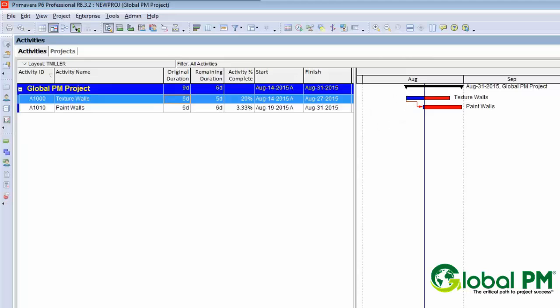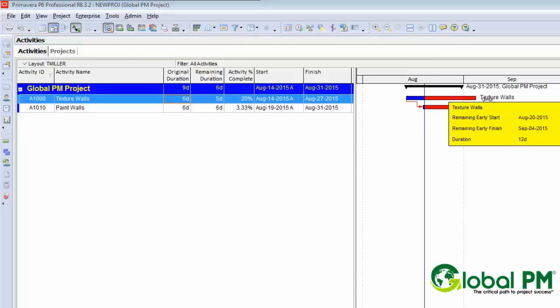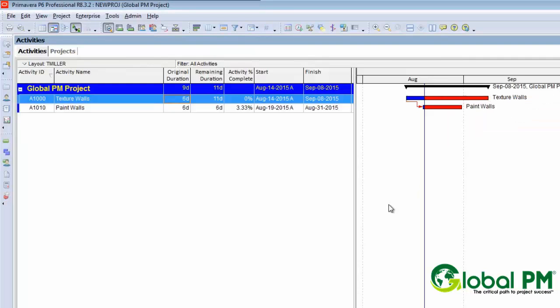Perhaps the situation is we're moving from one room to the next — texture room one, and then after texturing of room one is finished, we can start texturing room two and painting room one. The thing to look out for, though, is the situation where you have a delay in the predecessor activity. If you look at the situation here, we have paint walls scheduled to finish prior to texturing, which makes no sense.